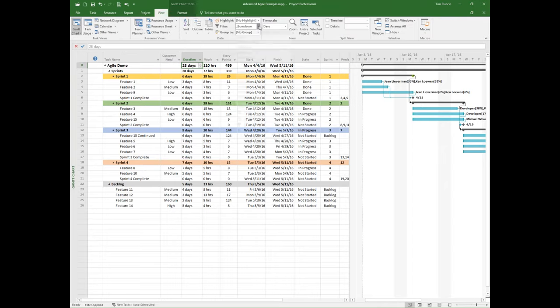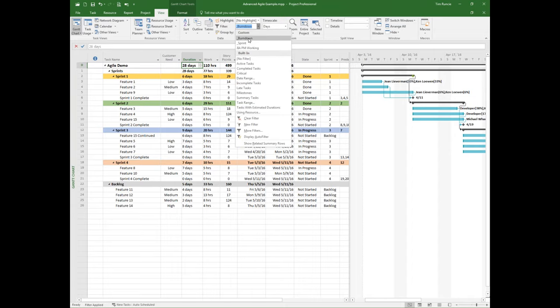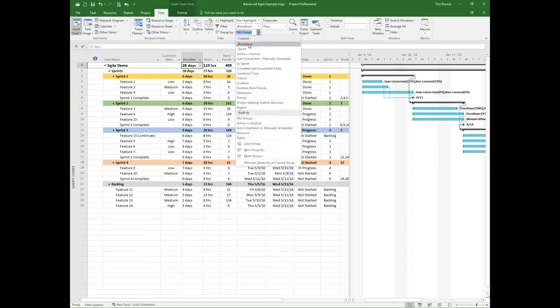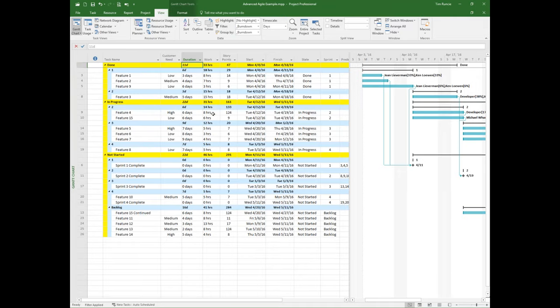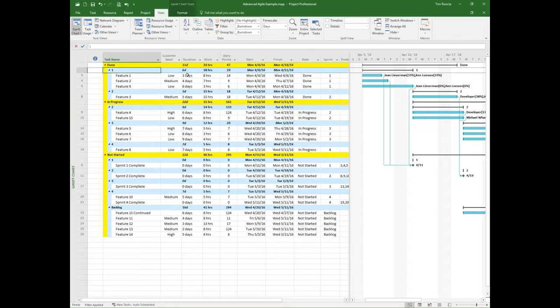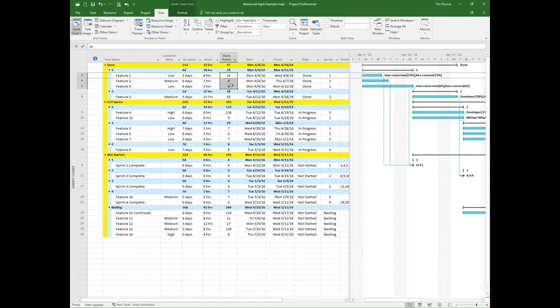So if I go up to my view tab, I can come in here and I can actually apply burndown views. I want to actually apply a burndown filter, or I want to actually change the overall visibility of a group to a burndown. And the idea is that I can group like items together here. In fact, I might be saying, show me what's actually finished, what sprint it's in, and of course I have my duration of work, but maybe I'm looking at my story points so I can begin to learn whether I have the ability to pull things off the backlog, or in future sprints I may not have enough time.